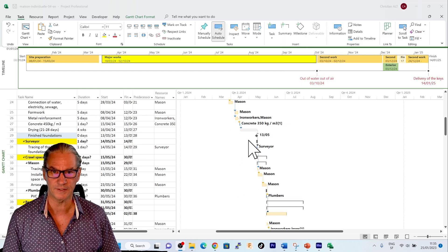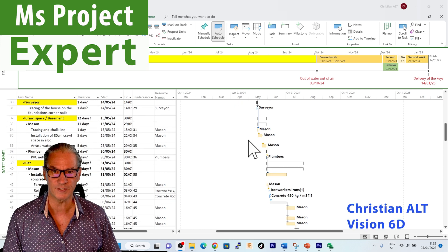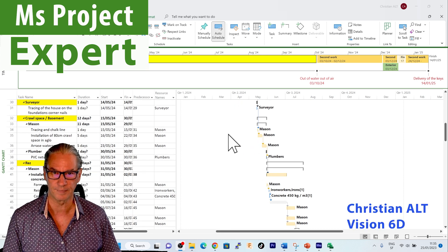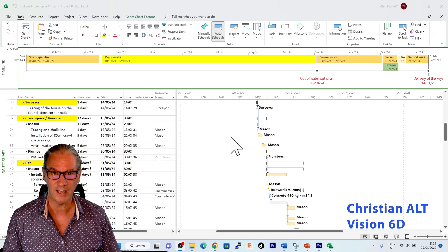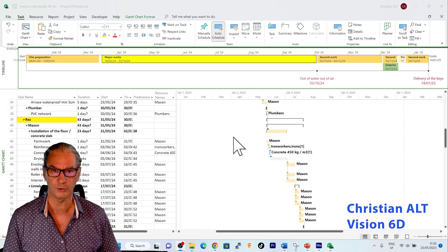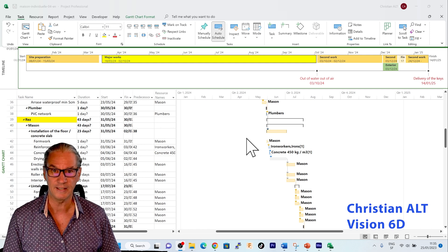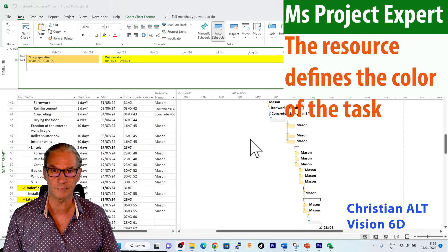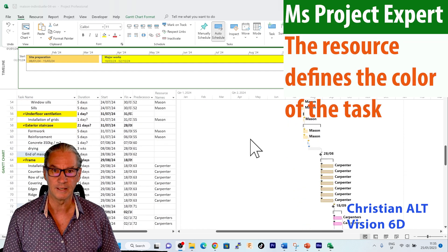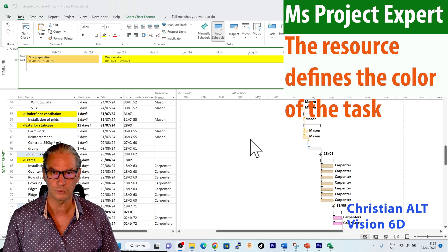In this case, the resource represents the different trades. If now I assign a certain resource to a task, it will automatically be colored according to the trade.